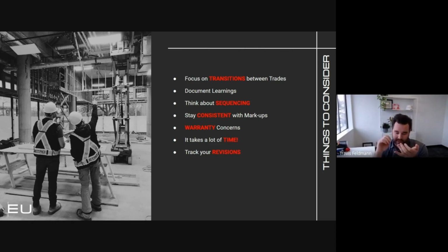So whether it be, you know, clouding the revision in red and flagging it in the next R1 revision and making sure that those changes are clearly pronounced to the wider group, because obviously if you make a series of revisions, you want to make sure that progressively throughout the tender process, you're updating that document so it's current and new and issuing that to trades, so then that way they're bidding off the current scope delineation.